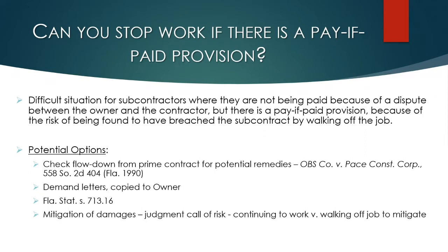One of them is to obtain a copy of the prime contract. And if it's incorporated by reference into your subcontract, there may be some potential arguments that the pay if paid provision may not be enforceable. There's a Florida Supreme Court case, listed here on the slide, the OBS Company versus Pace case. In that case, there was a pay if paid provision in the subcontract, and it was an enforceable pay if paid provision. But the subcontract incorporated the prime contract, and the prime contract had a provision that basically said that the